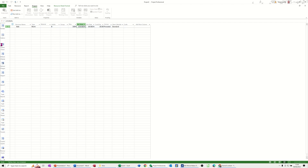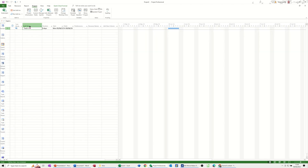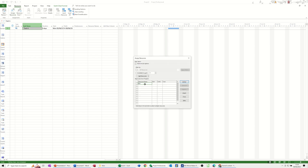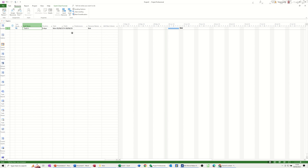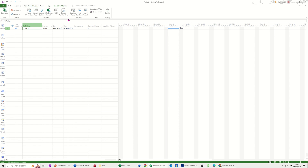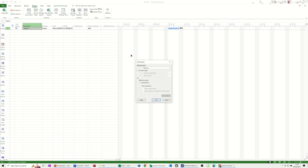I'll go back into the Gantt chart view and assign Bob. So I'll go to Resources, assign Bob. And let's say that's my plan. Now I'm going to save a baseline, and for earned value to work, you need to save a baseline, otherwise it's not going to show you anything useful. So on the Project tab, set baseline, pick the first baseline in this example.